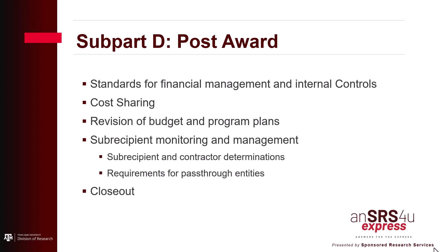Subpart D also provides requirements for a property system to inventory and track equipment purchased and used on a federal award. For closeout, the federal awarding agency or pass-through entity will close out the federal award when it determines that all applicable administrative actions and all required work have been completed by the non-federal entity. This section provides direction to the recipient to submit, no later than 120 calendar days after the end of the period of performance, all financial, performance, and other reports as required by the terms and conditions of the federal award.